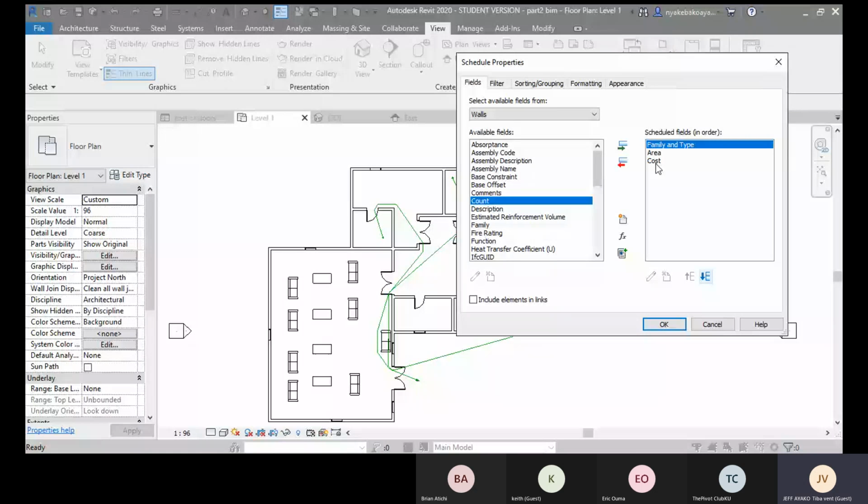But now we need to take the area multiplied by the unit cost for a small area. Once we multiply, then we sum up everything. After doing the summation, it will give us the total for that wall.